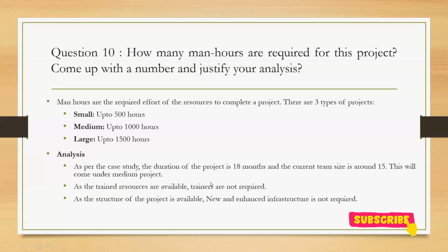Like, there is a BA. So the BA is working for 8 hours, 5 days a week. So how many dollars is being paid? Like, $50 per day. Likewise, you need to calculate. Okay. So BA $50 into one day into how many days you are working in a project, into the duration.